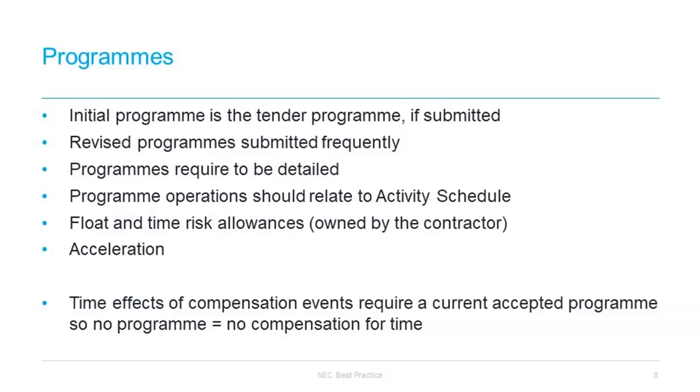the contractor is submitting compensation events which are then also being rejected. The time impact on the compensation event is assessed against the accepted programme, so if there's no updated accepted programme, even because the project manager is rejecting them, and even if that has been rejected for what might seem spurious reasons, the correct approach to any compensation event is to go back to the previously accepted programme.